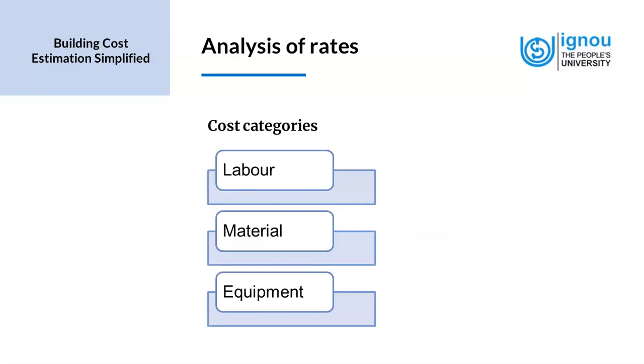Now, the main cost categories which contribute to the cost of a project are labor, material, and equipment. Some item could be just labor only, some material only. Like for example, for concrete, when we have to lay concrete, it requires labor to place the concrete. It would require material and also the equipment to pump the concrete into place. Some items like special inspections, etc., may not really fit into any of these categories of labor, material, and equipment, and these could be considered as extra.